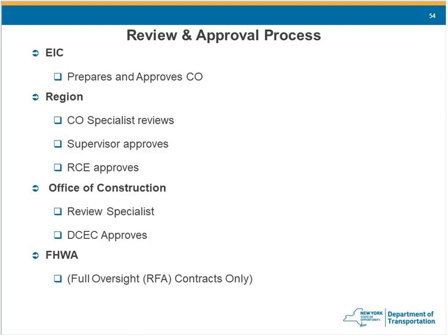I will advise you all, don't let your FHWA liaison see your change order on a contract for the very first time when they get that Site Manager notification. They should be in the progress meetings. They should be in the conversations. They should know that these changes are coming about. You should not be blindsiding them when they get the Site Manager notification.